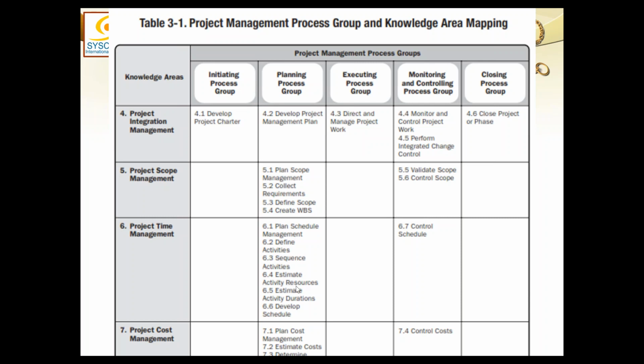Direct and manage the project? No. Actually, we will create an archive for all these interim documents, because these interim documents help us reach the final version. That final version we have as the baseline, and that is what we are implementing. But those interim documents must be stored securely somewhere, and that archive is called project documents.